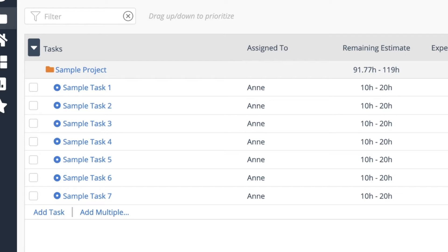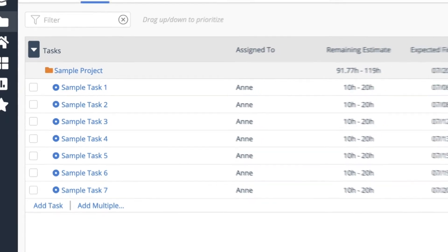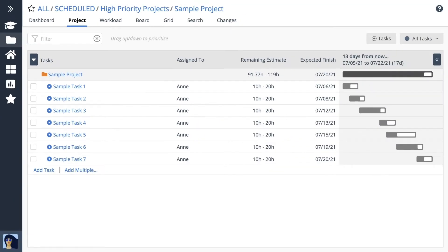The remaining estimate is a range of hours. It's the best case, worst case scenario for how long it could take to finish.